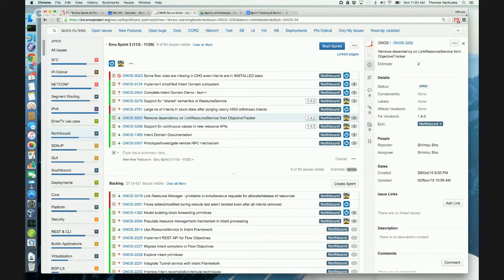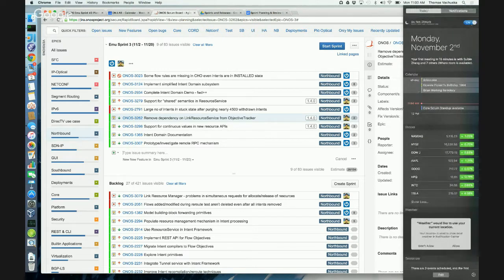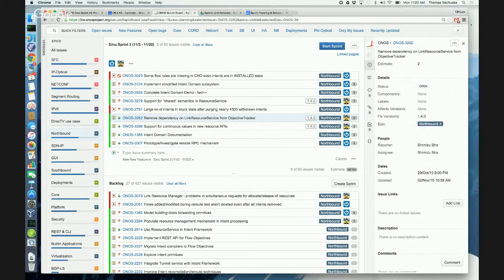So the fact is, regardless of the story we want to do or not in this specific context, to make this thing make sense, for me, we should really say together how much more we want to overcommit, in terms of percentage. Do we want to commit like 20, 30% more? Fine, we agree on that, and those are the story points we should go for. Because if we then say, sure, 50% is okay anyway, 80% is okay anyway, and then we don't do it, it doesn't really make sense to keep track of all these points. Just that.